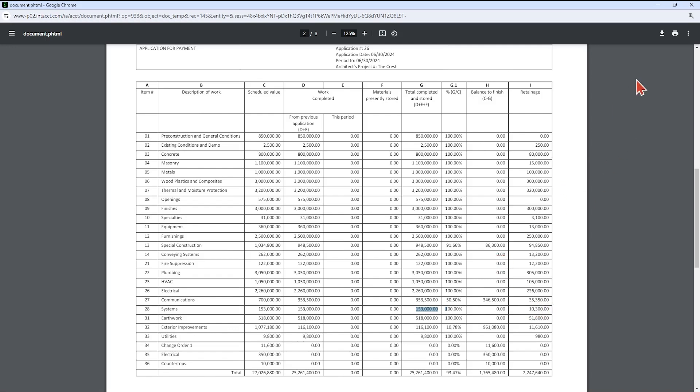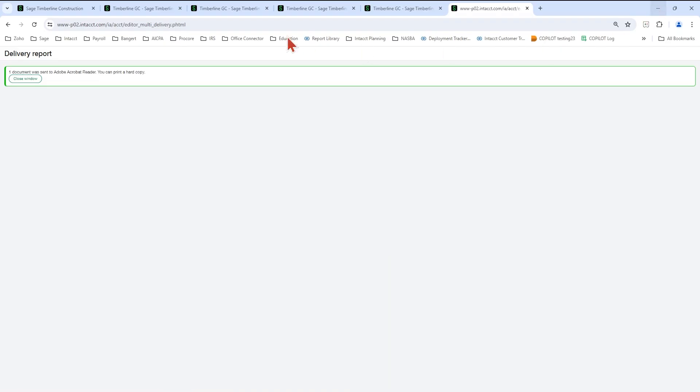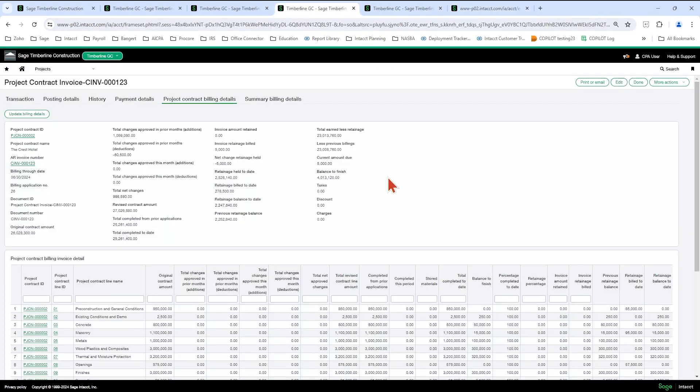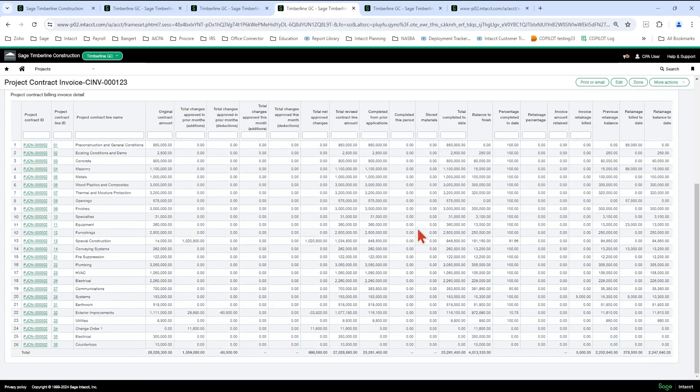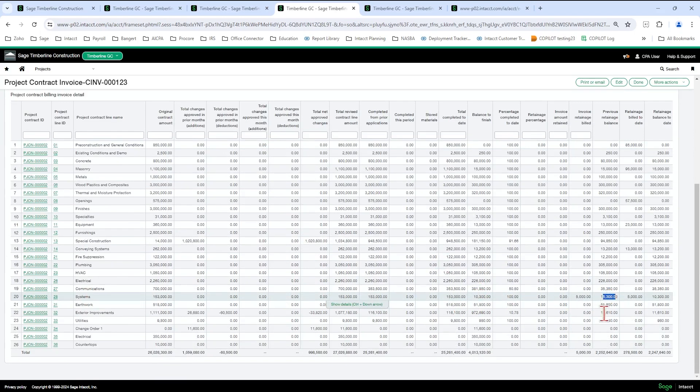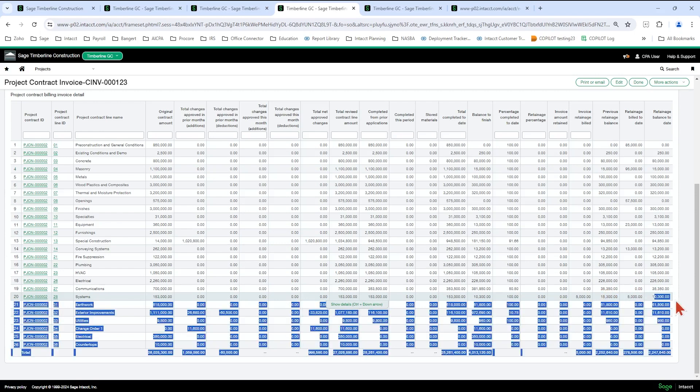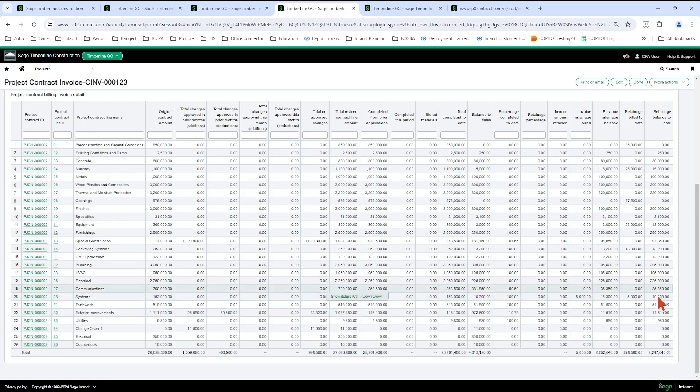Okay. So let me go back to the actual invoice in Sage. And you can see my 28 systems line here. I've got my $153,000. Originally, I had $15,300 in retainage. I billed $5,000. And now I have $10,300 left.